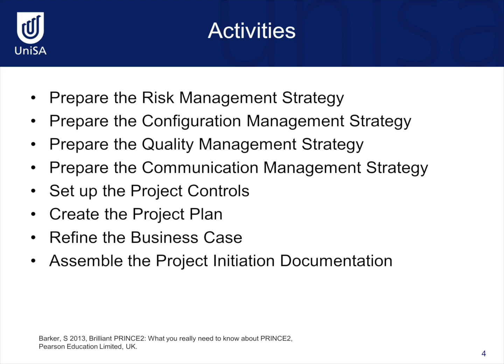So as part of this particular process, we need to prepare a number of strategy documents. We need to specify how we're going to control the project. We need to plan the project to come up with a project plan, and we need to refine the business case that was created in outline form in the starting up a project process. It seems like quite a lot of work, but by doing this work up front, all the mechanisms are in place to ensure, as far as possible, successful outcomes for the project.